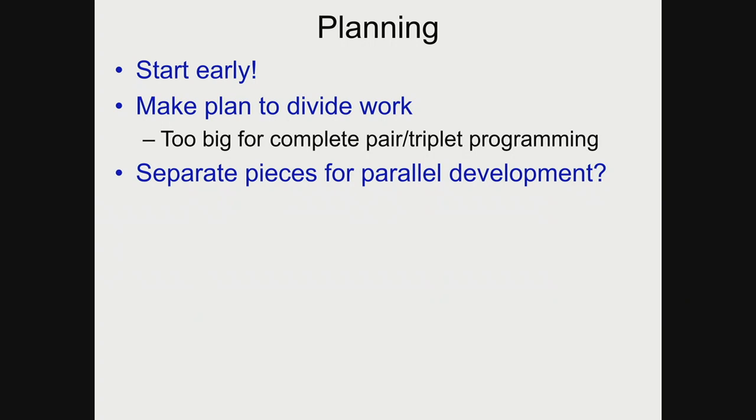Okay, so we got the idea of algorithm and UI separate. It's a good idea. How can I test essentially the UI when I don't have an algorithm yet? And this isn't a really complicated question. So if you're going, oh, okay, so C07, what do you think? Maybe create a fake set of data to put into your UI.